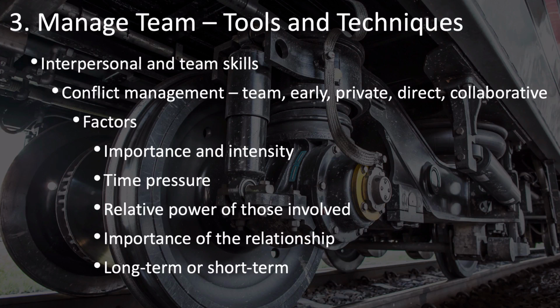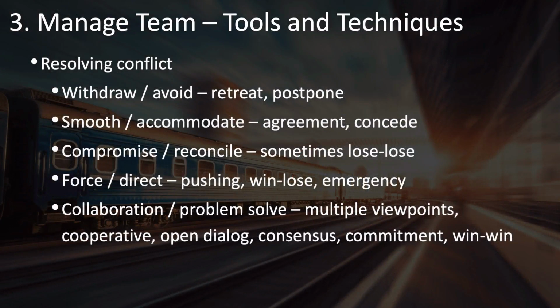As they and you get involved in conflict management, some factors that you need to take into consideration are the importance and intensity of the issue, the time pressure or urgency to resolve the issue, the relative power of the people involved in the disagreement or conflict, the importance of the relationship between them, and whether you're looking for a long-term or short-term solution. When resolving conflict, there are a number of different approaches that you can take, and some are better in some circumstances and others in other circumstances.